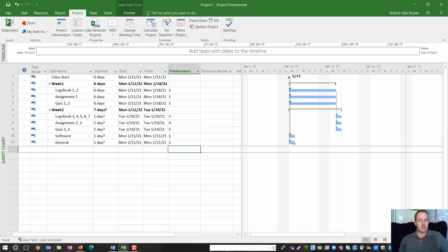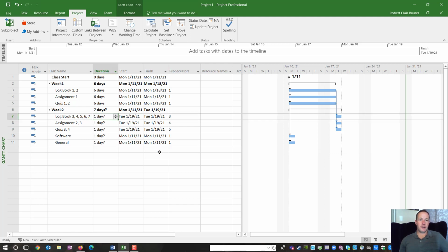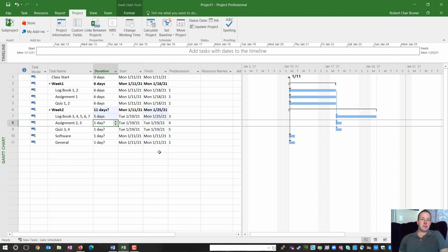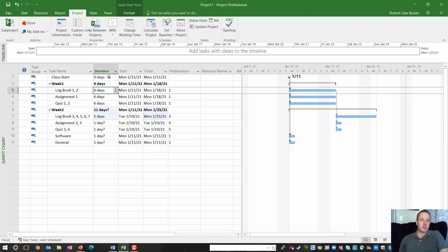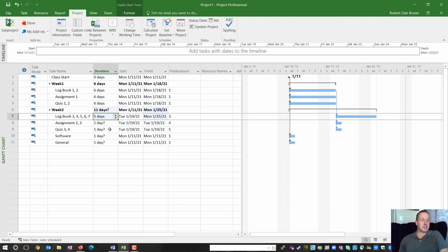But we're going to have to give it some longer durations because we did start these at the beginning of the class, but we want them to be due on that next Monday. So we're going to have to adjust our durations. If we plug in 5, it's going to make it due the next Monday. Now, this one was 6 because it included Monday, the first Monday of the class. So we had 6 to get it due the next Monday. Now we're plugging in 5 because it doesn't include Monday, because Monday is included in the lines above. All right?